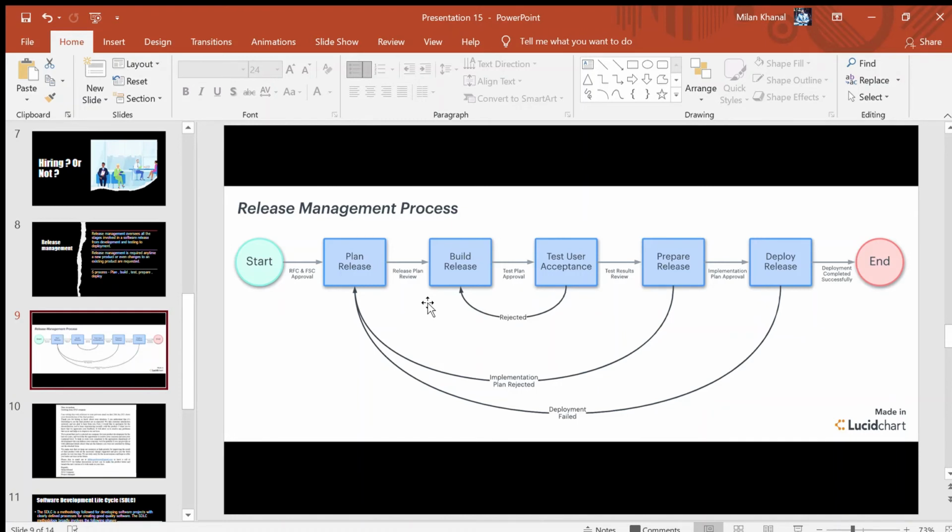That is why, if the project delivery is in January, we have to complete all the features and be ready for the production before the last week of December, so that if there is something that needs to be added or figured out, we can always recheck those features.